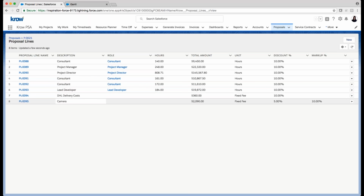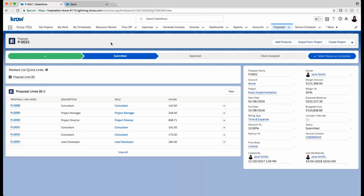I can also have fixed items related to this particular project or proposal that I'm creating, such as maybe there's some delivery costs, or I need a camera. This came from one of our customers that they do in-person webcast delivery for customers, such as board meetings and so forth. So they have resource costs, but they also have fixed costs, such as their camera equipment that they will be shipping to the client site when they create those in-person webcasts. So all of that can be part of your overall proposal. And as I'm creating my proposal, here it's generating a real-time margin percentage, the revenue and the cost amount. I can apply an overall discount or markup to this proposal, as you can see here.